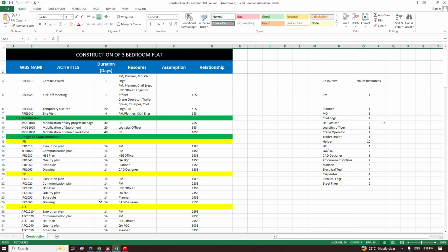Just imagine you assigning one person to work on two projects at the same time, the same day. So automatically it means the person is going to share himself into two, right? It can happen by mistake or because of improper planning. The software has a way of figuring it out and indicating that this person is overloaded. We'll also take a look at it as we progress.